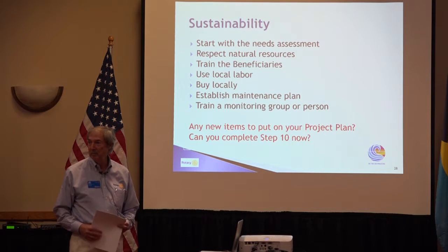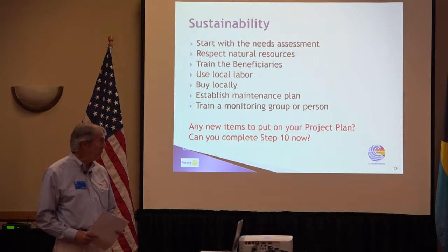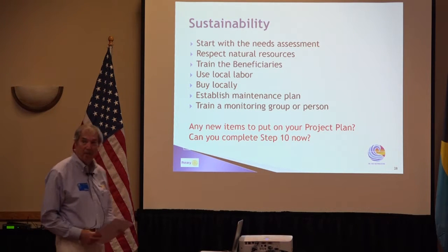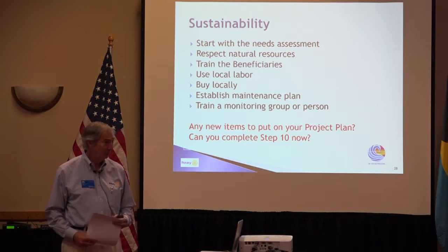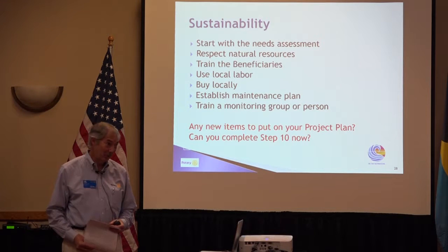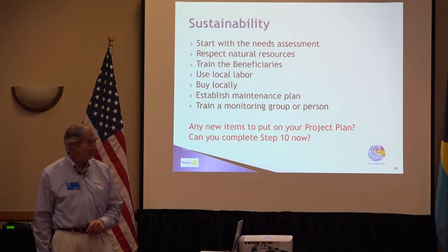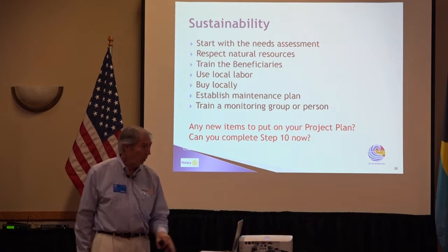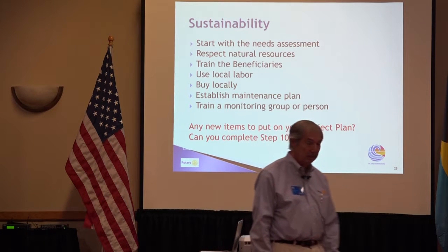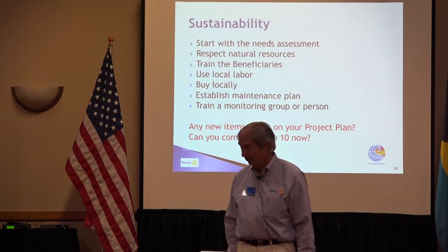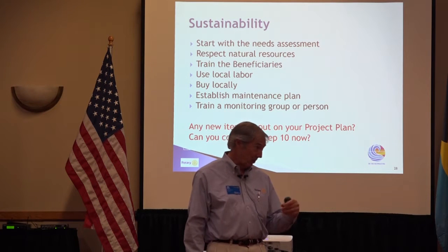What do you get, a maintenance manual or a user's manual? Yeah, I was going to say, about documentation. Maintenance manuals and users manuals. Operating procedures. In the right language, yes. And who's going to do this stuff in the right language? Hopefully the manufacturer. Or the host club, the local. Host club preferred because the dialect can be different. Yeah, most likely the host club, but they've got to sign up to do it, right?